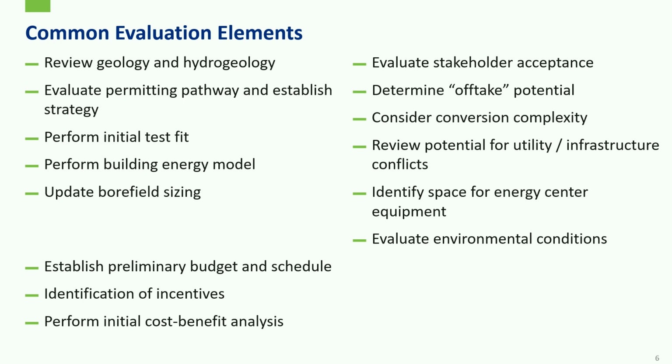And so do you have space to put in a pump house that's going to house things like an electric boiler, glycol feeder, air separator, pumps? That can go in somebody's existing building, that can go on another piece of property, but typically now you're having to consider acquiring more land. So these are considerations to just have in front of you and laid out for feasibility.